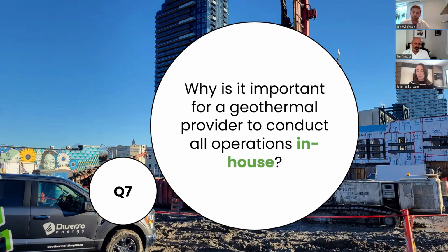The drilling itself, if you're not drilling with your own in-house team, you're relying on a subcontractor, which can be fine, but also can cause scheduling conflicts. And if you're not in full control of their activities, those horizontal tie-ins are just the same as the drilling, and then mechanical services and work. And then to finish, really, the operations of the system in the long term, which is incredibly critical, because the last thing you want to do is design this wonderful system and hand it over to, let's say, an inexperienced geothermal provider to manage it in perpetuity.